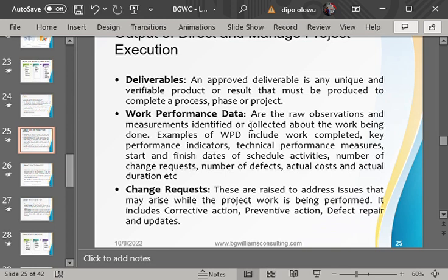That is the actual raw information or data from the work being done. But it is possible that in the plan, we planned that work should be done in 7 hours. But the actual data collected is that the time they completed the work is not 7 hours as according to plan, it is 10 hours.